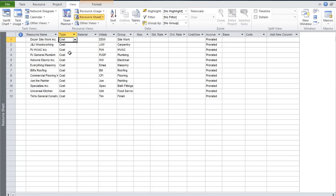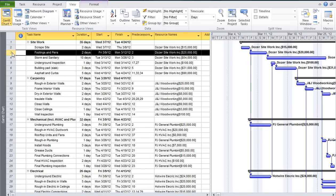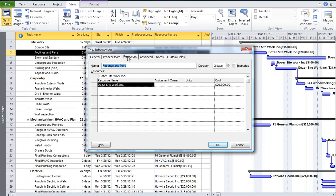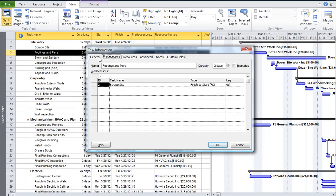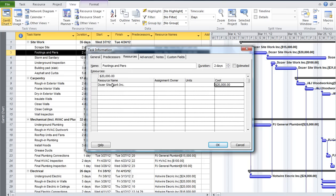Work would be for a time and materials basis, but this is a fixed price contract, so we set that to Cost. Then over here where we've set up our task, if you double-click on it and go into the details — Resources, Predecessors, General — Dozer Siteworks has been assigned to that task and they've given us a bid of $20,000. This cost field is only available if the resource sheet type is set to Cost, and that cost is then only associated with Dozer Siteworks for that task.